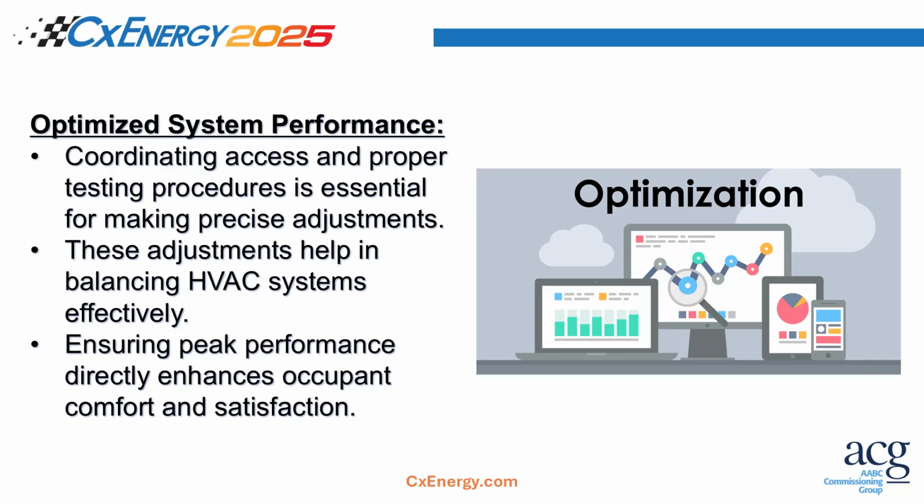And then optimizing system performance, trying to identify conflicts that we might come across throughout the process. Is there a high ceiling that we need to get into? Are they putting hardwood floors down? When are they putting the floors down? We want to be able to try to get into these areas to balance properly, just so that way we're not hindering any performance later on.